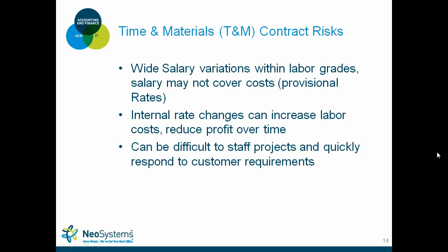Well, let's say that employee leaves, and he was making $80,000, and then you find another replacement, but that person demands $120,000. Well, you're stuck with that bill rate. You can't go back to the government and say, oh, by the way, I've added someone more expensive. Can I increase my bill rate? So essentially, you're stuck with the bill rate. That's a risk within T&M contracts.